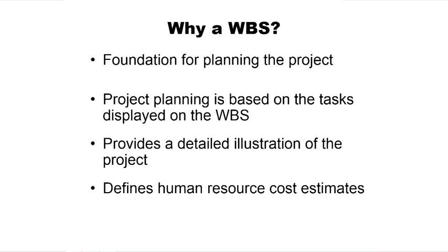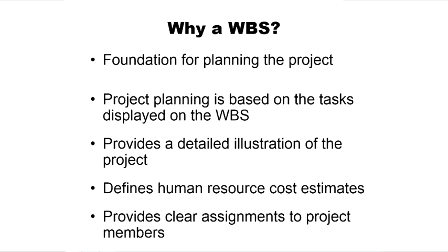By the time you're done with this thing, you'll have a way to define your human resource costs, and it provides assignments for people. So this is going to be the foundation for costing, for resources. It's going to be the foundation for our schedule. It could also add a number of elements to our communication plan. This piece is going to be the foundation for a number of other elements in the project plan.